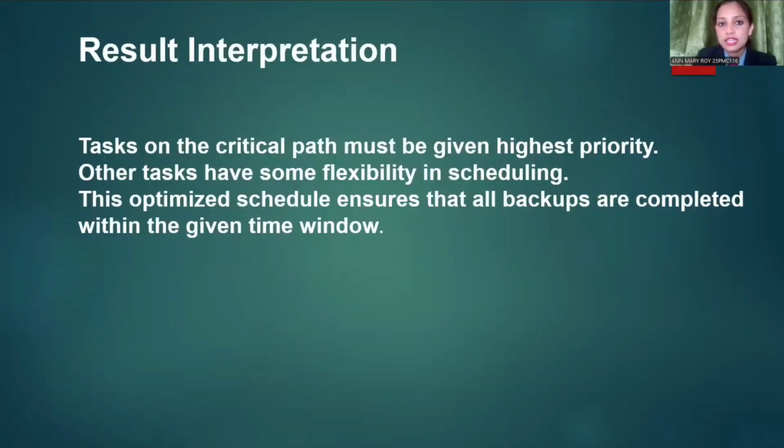The tasks on the critical path must be given higher priority. Other tasks may have some flexibility in scheduling. The optimized schedule ensures that all the backup jobs are completed within the given time window.